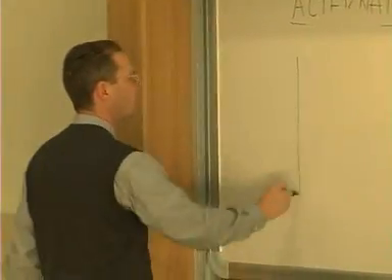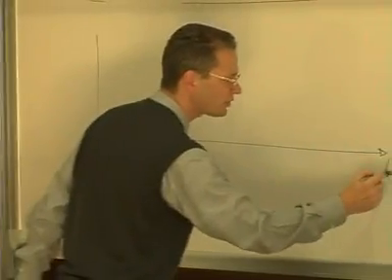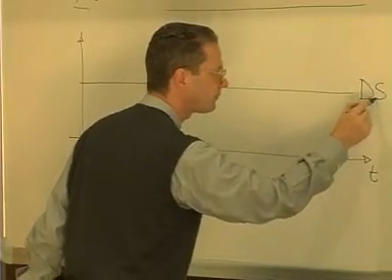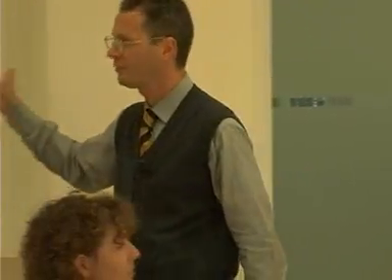Suppose to consider the case of the French amortization. French amortization means that every year you have to pay a fixed amount of money, and that fixed amount is the sum of the principal amount and the interest amount. And the sum of the two is fixed. Okay? In this case, you are asking your project to pay a certain amount of debt service, where DS is the sum of capital repayment and interest repayment, that is fixed throughout the life of the loan.